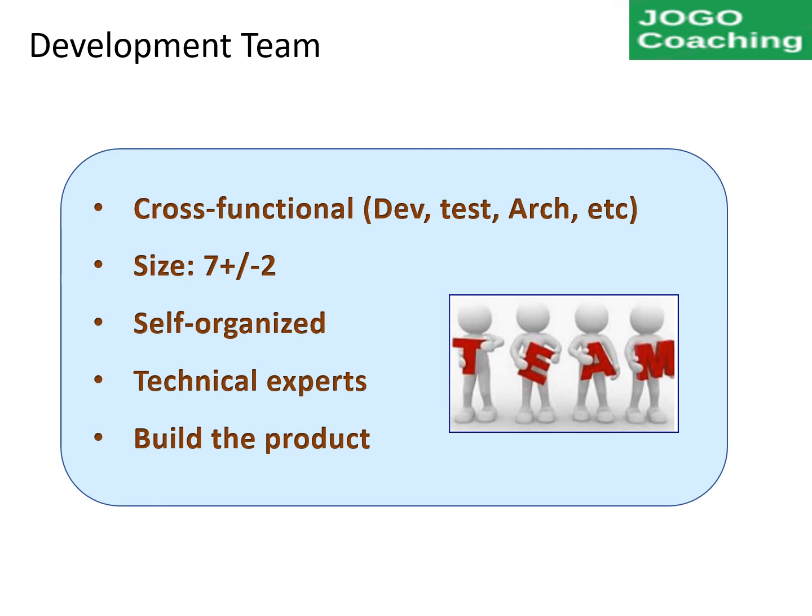A few key points about the roles: One person can't play both Product Owner and Scrum Master role in the same team. Any developer can play the Scrum Master role. One Scrum Master can manage multiple Scrum teams. But developers should not be part of more than one Scrum team.